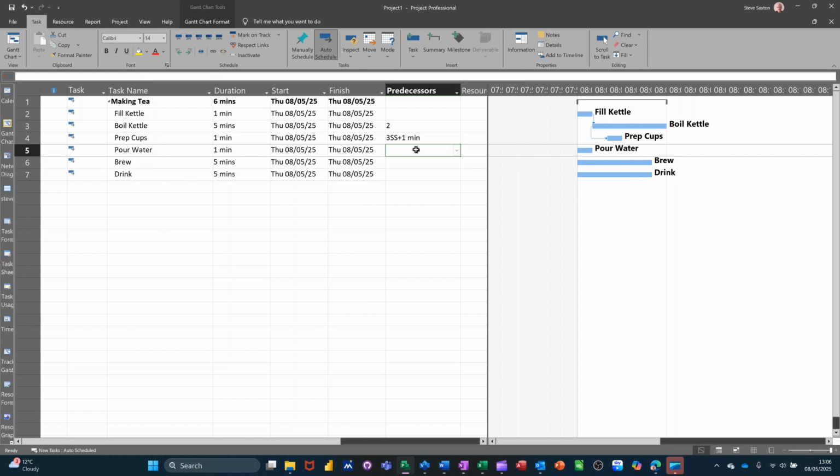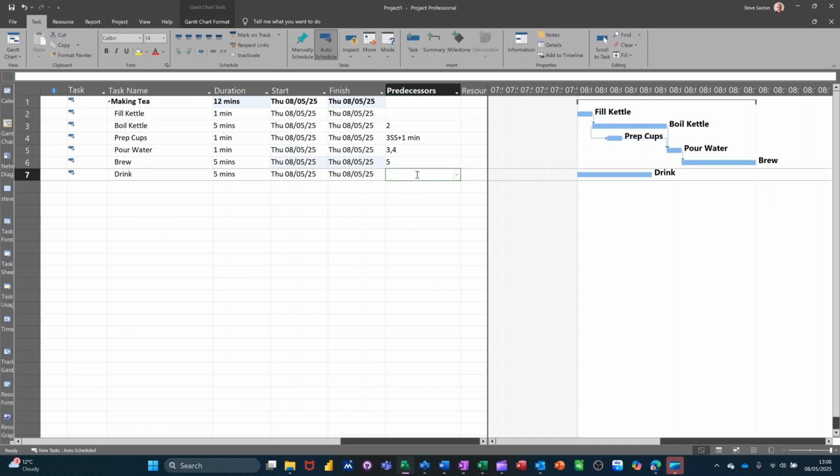So once that's done, after that, pour water will follow boil kettle and prep cups. So that's 3, 4 in there, task 3 and task 4. Brew will follow 5 and drink will follow 6. So my 15-minute tea break's gone a bit pear-shaped because that says 17 minutes, and you can see that over there.